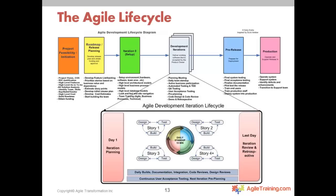The agile lifecycle I'll walk you through starts with feasibility and initiation — specifically for large or medium-sized initiatives going through an initial approval process, just as you would today. Lighter-weight techniques can speed that up. Once the project is approved and the team pulls it into their backlog, the lifecycle really begins with release planning. That's where the team meets with their sponsor and product owner to build the backlog — not at a detailed level, but at the story level.